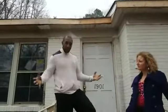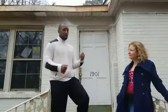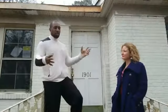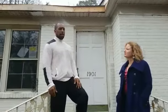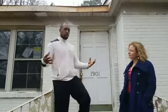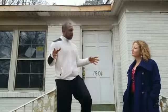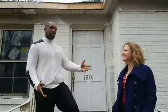On the interior, once you do the electrical and the plumbing, then you have to pull the house back together. Let me back up. You also have to do the HVAC, which we are doing here as well. Once you've torn all the walls down and you've seen what's on the inside and you've done the mechanical work, then you put it back together. In this house, we actually did open up a couple of the walls, which we'll see in a second, to give it a little more space and make it feel more 2018-ish. Open, yeah, is the word? Well, that's the word, but it's got to sound chic or cool. A little more millennial friendly, open spaces, less boxy.